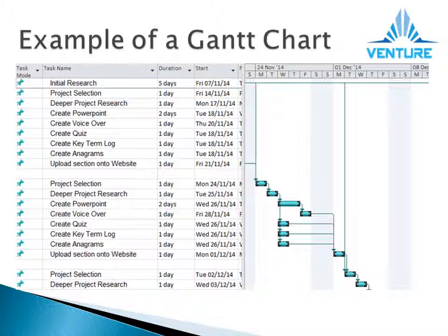As you can see from the diagram, the Gantt chart allows you to set exact dates of when certain tasks need to be finished by. By setting predecessors when one task cannot start until another is finished, the Gantt chart will show you which date and time frame you need to complete the first task to allow the next to start. This is known as forward scheduling.